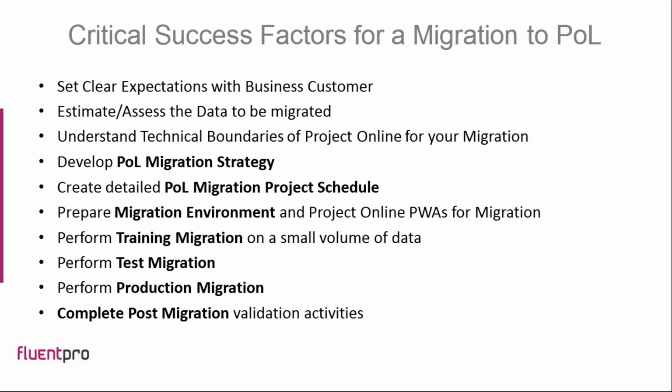We found a lot of benefit in doing, even before doing a test migration, just doing a training migration on a small volume of data. Then after having that experience of how your environments and your network are going to perform, doing a test migration. Now, test migration is essentially a dry run of the entire data set.